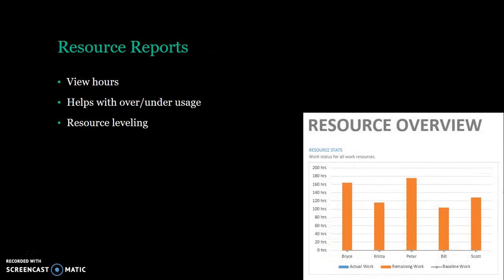The resource reports is something I also thought was pretty interesting. Not only can you view all the hours that people would be working on it, it helps with over and under usage. So with mine, it seems like Peter and Bryce have a lot of the work. Well, Bill does not. But you can also use this to resource level if you really wanted everyone to have the same amount of work effort during the project.